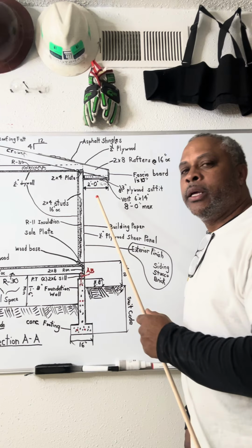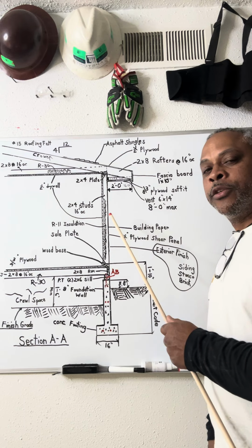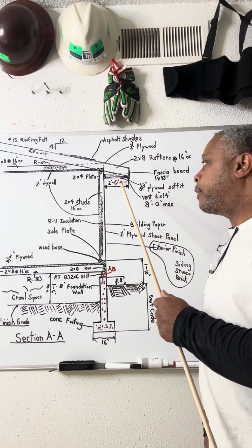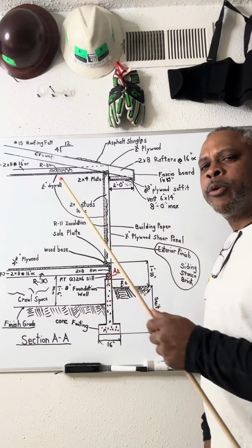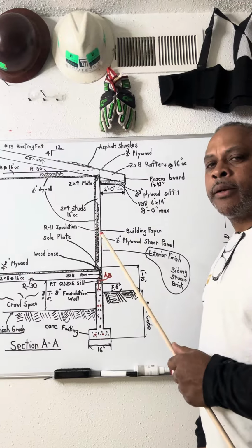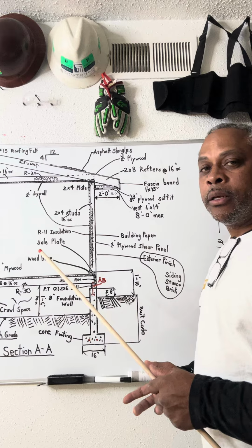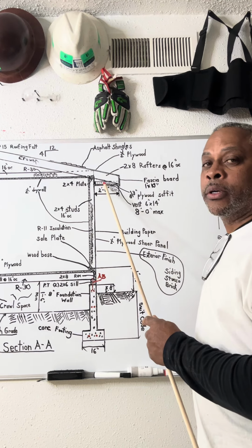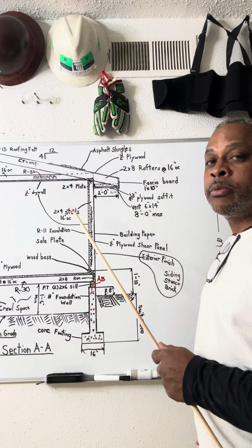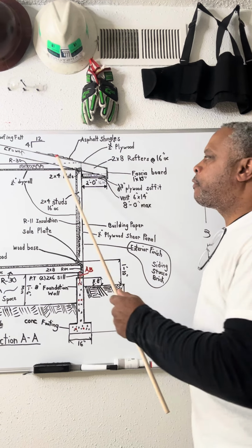And if it's 2 feet, now you have to calculate. 2 is 4 foot, 3 is 6 foot, 4 is 8 foot. That's an 8-footer. Now, if you have these going all the way around your perimeter, you have to multiply and calculate the total length that you need for all these soffits, these outlookers. Some people call them outriggers, outlookers. You know, fascia board also in the front.